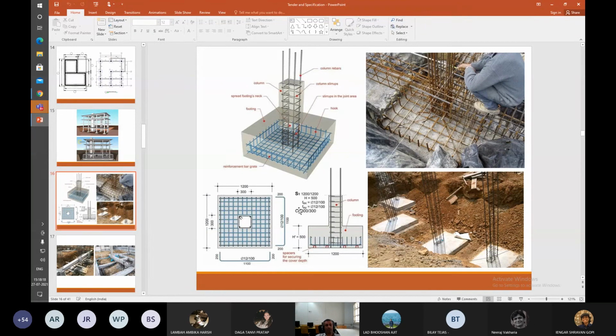concrete 1 is to 1.5 is to 3 with appropriate admixtures and thorough compacting. You know what thorough compacting is, you must have seen they put vibrators. Have you ever seen they put vibrators in order to make sure that your concrete does not remain hollow and it gets compacted? And laid to slope and cured as instructed. Right? This is the right kind of specification you will write.